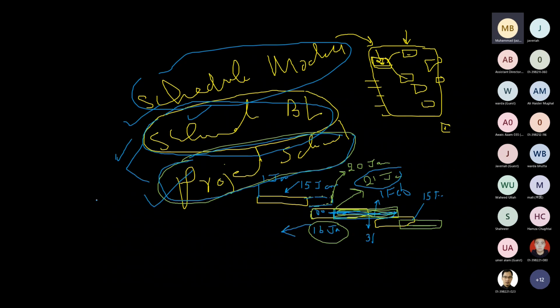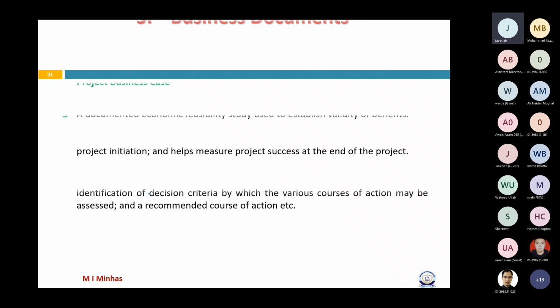Now, please remember one thing, that planning is not done once only, right? During the first phase, everything is fine, but during the second or third round of planning, or when we revise our estimates, or when we again determine our new budget, at that time the schedule baseline would not be very effective. At that stage, the project schedule would actually be guiding us correctly, isn't it? Yes, sir. We do that in reprogramming.